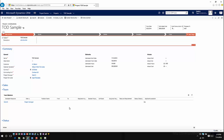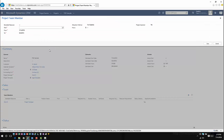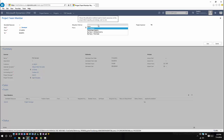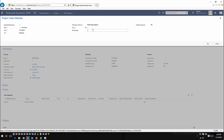Now I can go ahead and start adding individual people to this role based upon what I want to do. For example, let's say I know I'm going to need a developer on this project. I could hit add new and define the person I want to bring in. If it's a specific person I want to work with from a time perspective, I can define who that is. But if I'm not exactly sure, I could specify the type of role — like developer — that has been pre-designed within the application. It gives me a start date and end date based on the timeframes I have. I could define whether I want to schedule this person to full capacity, percentage, or hours. I'll go ahead and do this as a percentage at 50% of the time.